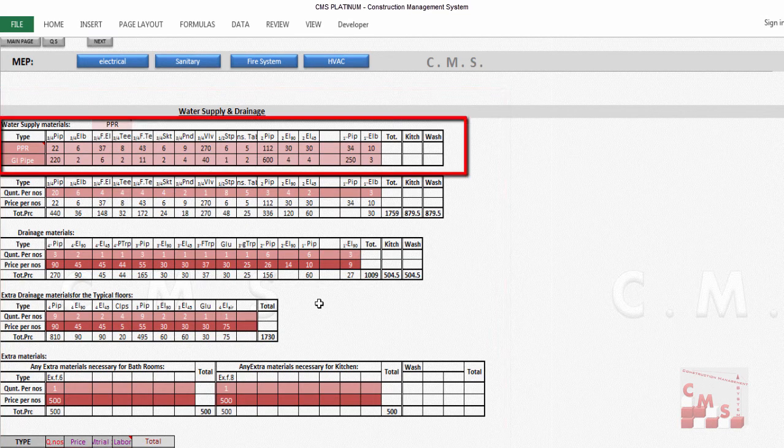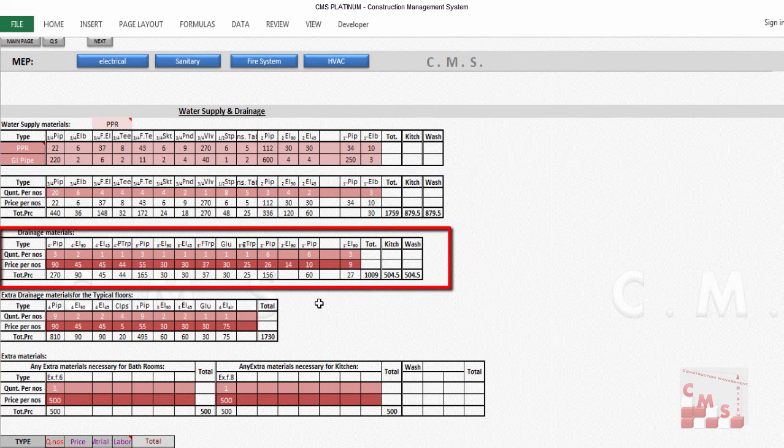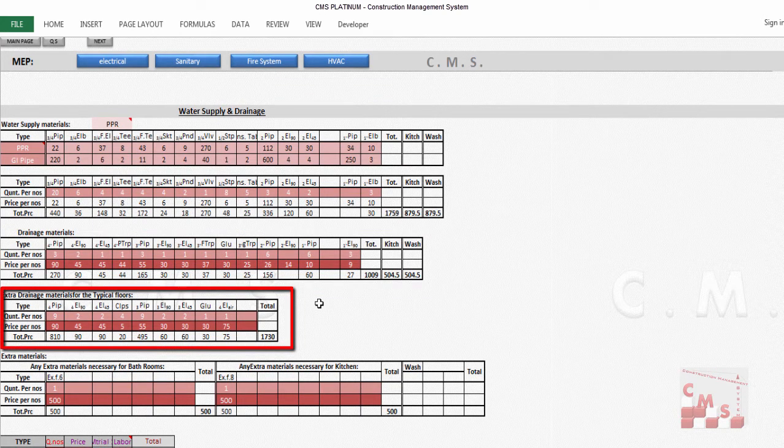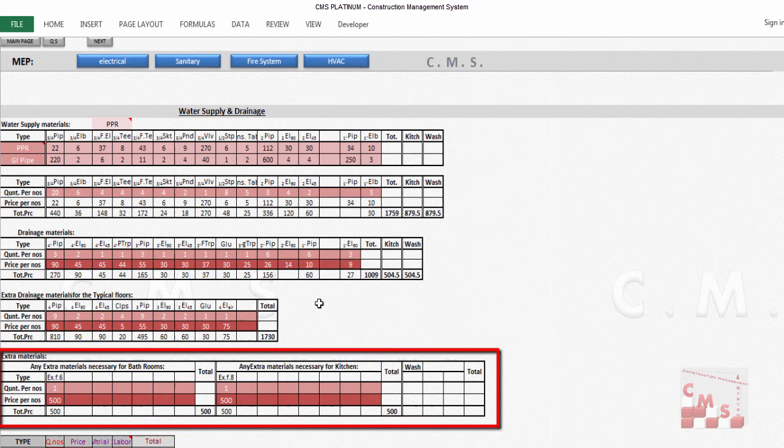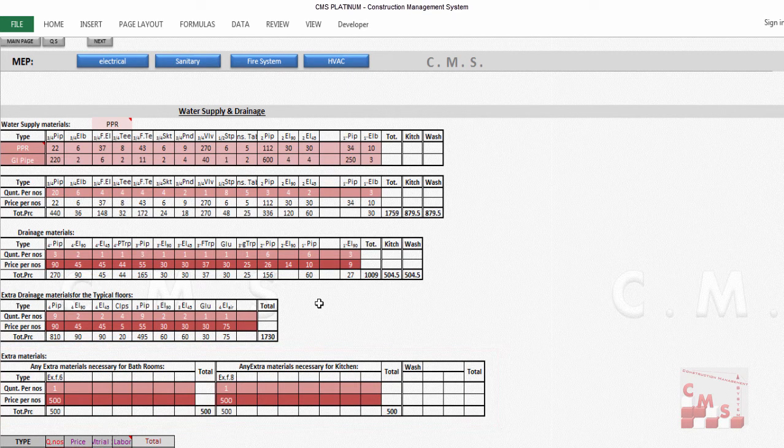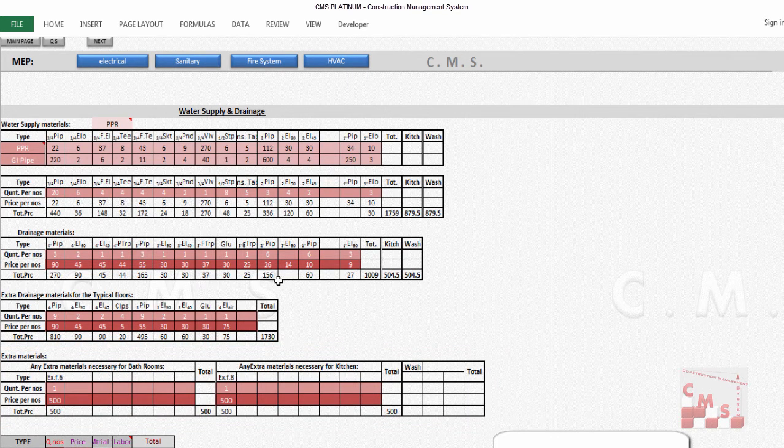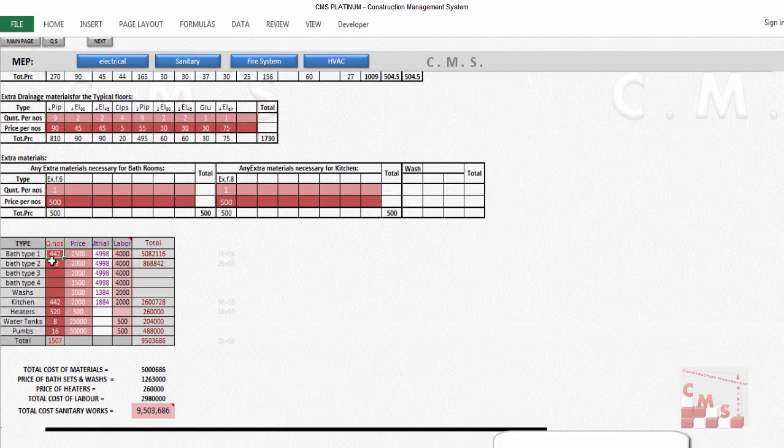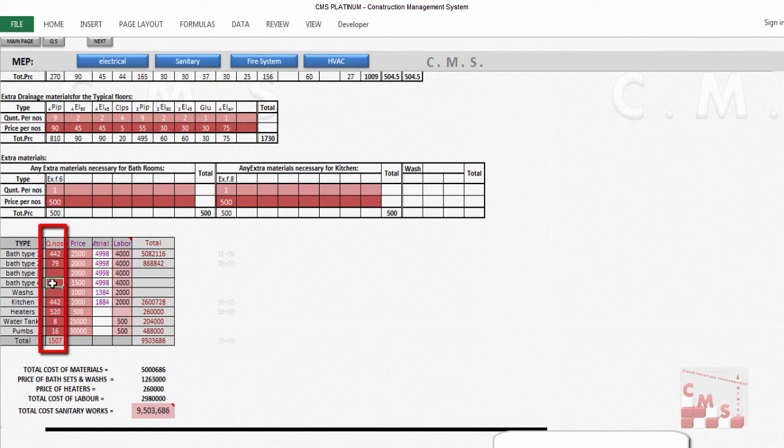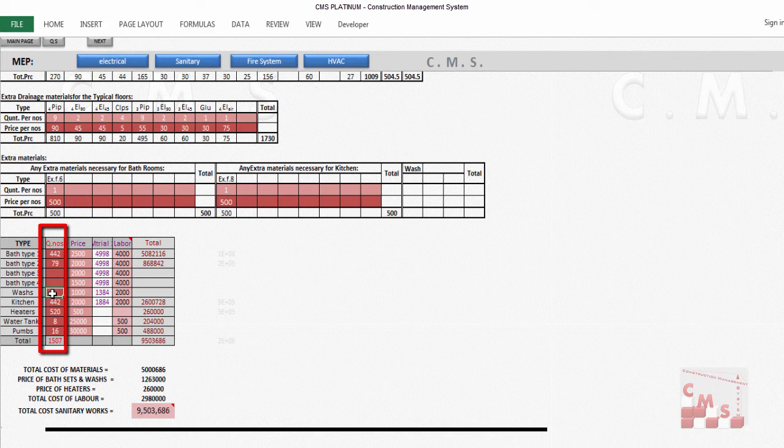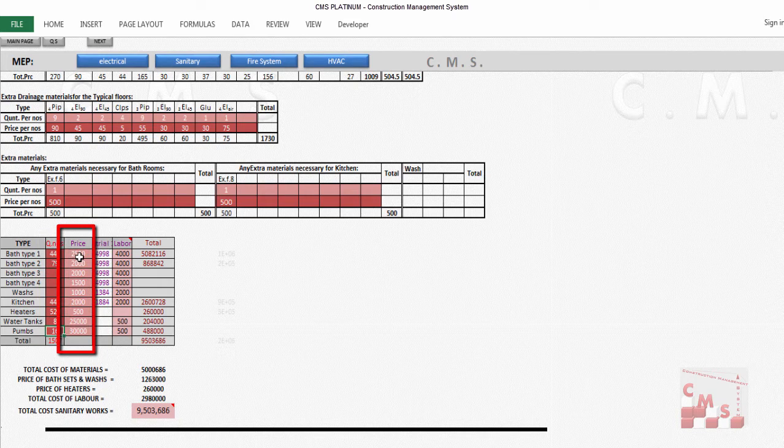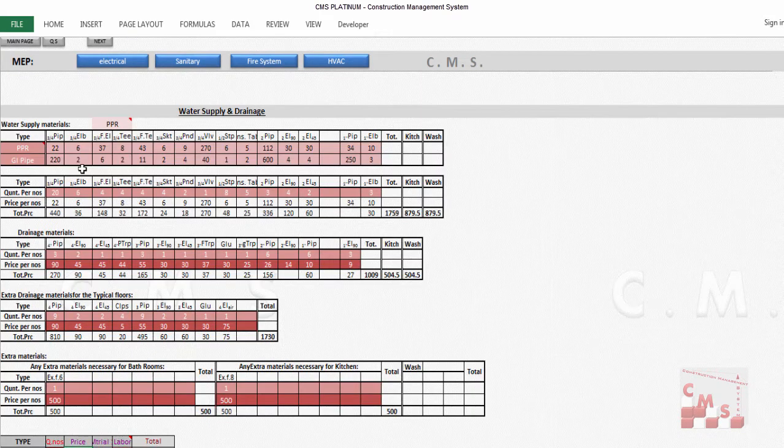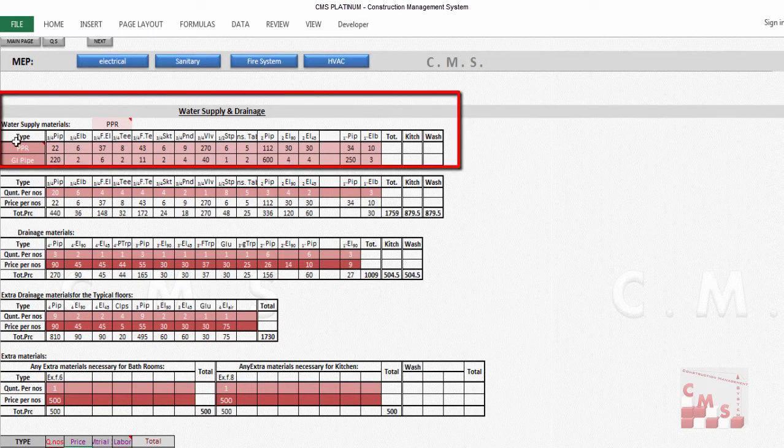This provides all the required material for each bathroom, all the required materials for the wash, WC, and each item related to water supply and drainage work. You will insert the numbers of bathrooms according to their type: wash area, kitchen, numbers of heaters, sinks, and pumps. Then you'll put a purchasing price for these items according to the market. Let's talk about these tables.